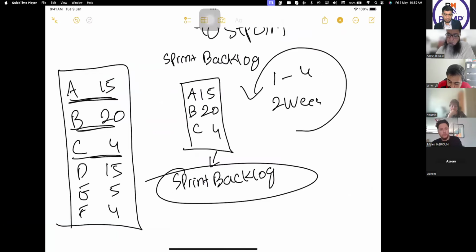We will have a daily stand-up. What were the 3 questions we asked in daily stand-up? What you did yesterday, what you are going to do today, and any blockers. Daily, we share progress. Daily stand-up is the third ceremony. The first was sprint planning, then daily stand-up. So far, are you with me, guys? Okay. Yes.